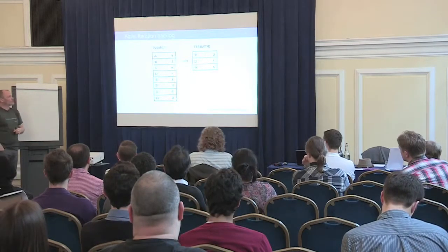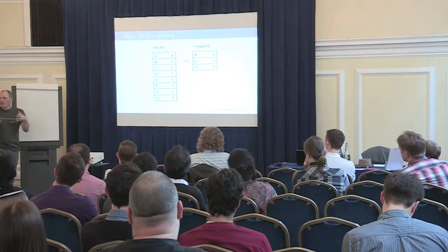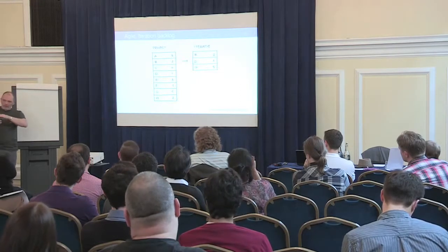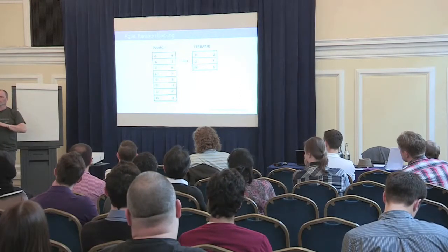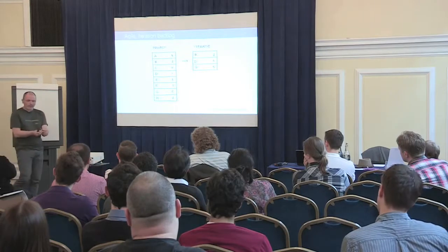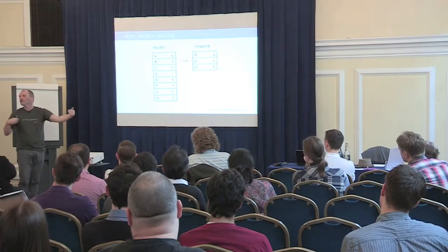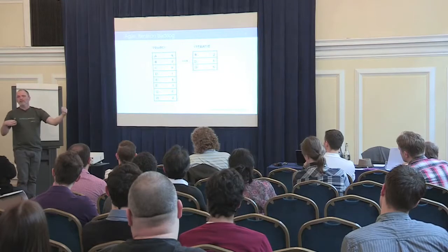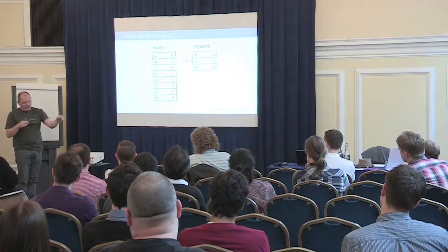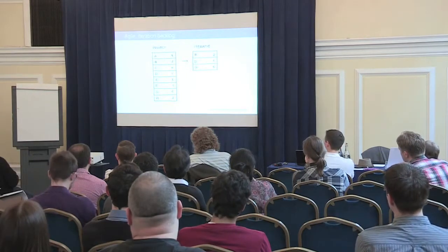If you go into a typical Scrum project, well, let's say typical because, as you've seen in my keynote, Scrum itself does not tell you how to do this, right? So what most people do in a Scrum project, they pick up the backlog items and cut them up into tasks. Who of you is doing that? Okay. And then usually what teams do, but there's no law that you have to do it like this, is they try to estimate the individual tasks in hours, and then see if that fits the 2-week or the 4-week period. I've seen teams struggle with that, sometimes taking even a full day out of the 2-week sprint to find out how much work you can actually do. So to me, that is a bit overdone, let's put it like this.